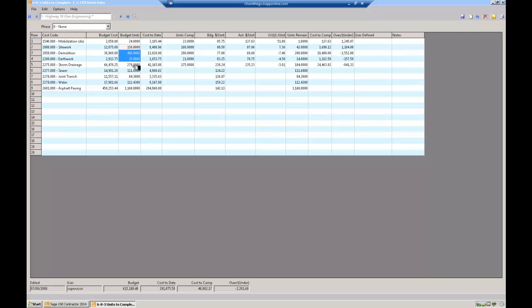I don't care. As long as you can measure the quantity, you can enter estimated quantity, and then this is the cost to date. This is what's run through payroll, accounts payable, equipment cost. And then you're going to just ask the guys in the field at the end of the week on their last time card is how many units do you have complete? And we'll just say on site work, of the 150 cubic yards, I've got 115 of them done.